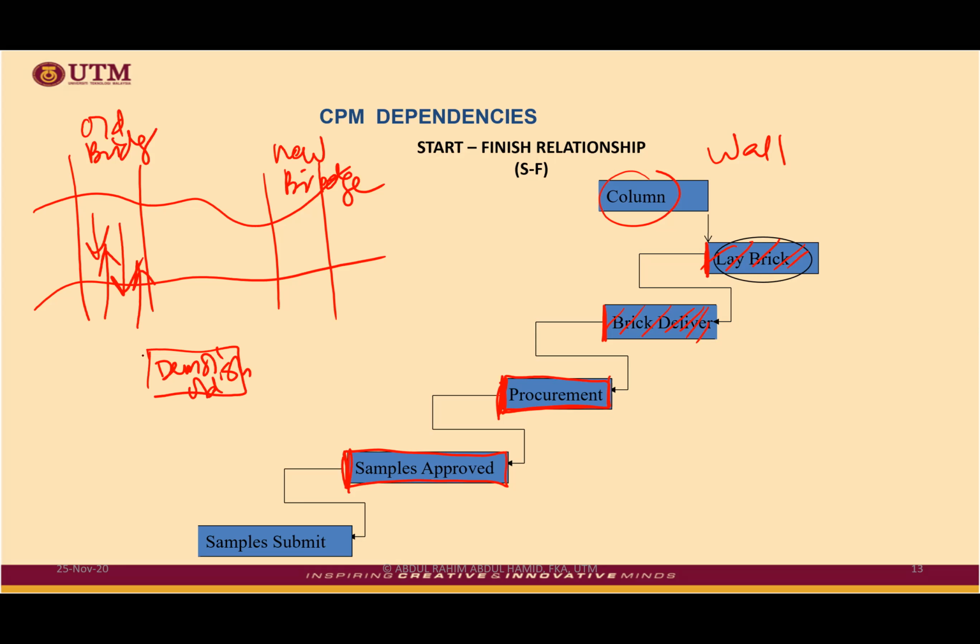When can you start demolishing the old bridge? For sure, you can only start demolishing the old bridge after the completion of the new bridge. When the new bridge is already completed, finished, then only you will start demolishing. Otherwise, where are people going to use the bridge, if the new bridge is not completed yet? That is one example. Okay, there could be many where we can use that kind of relationship.